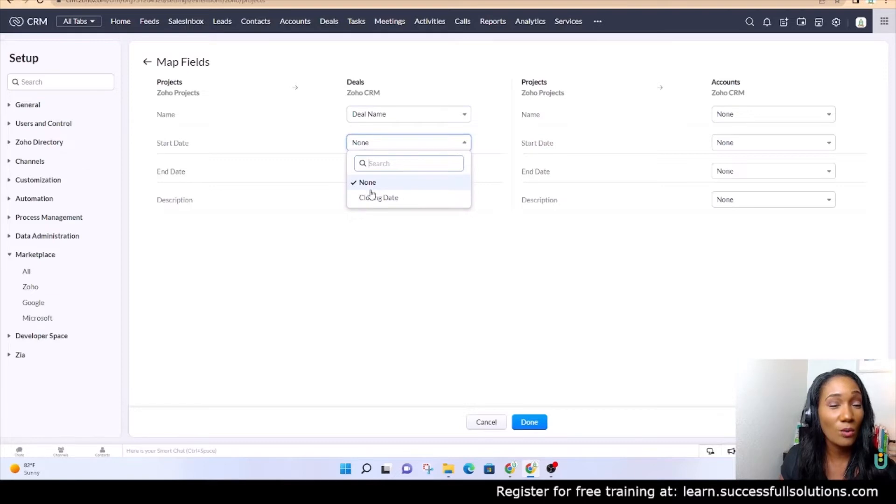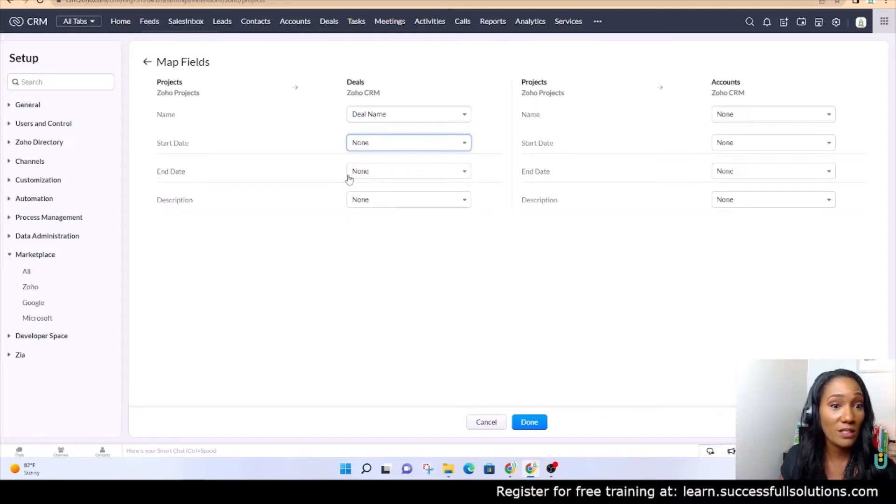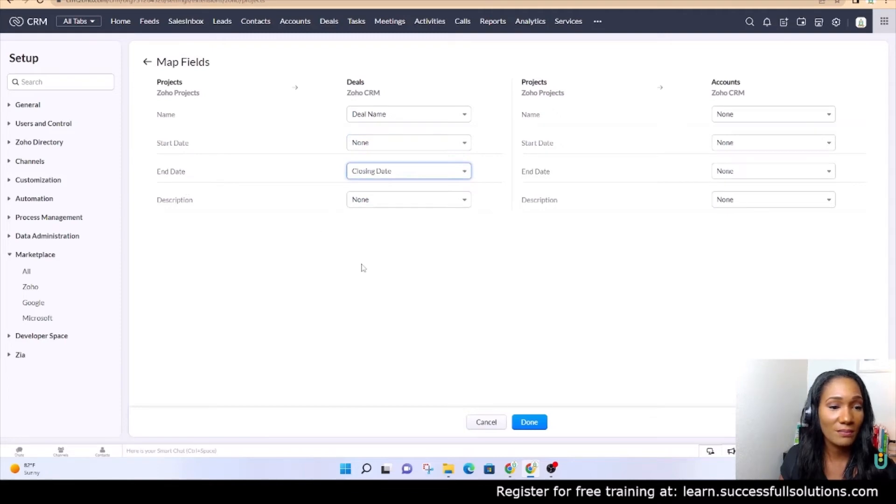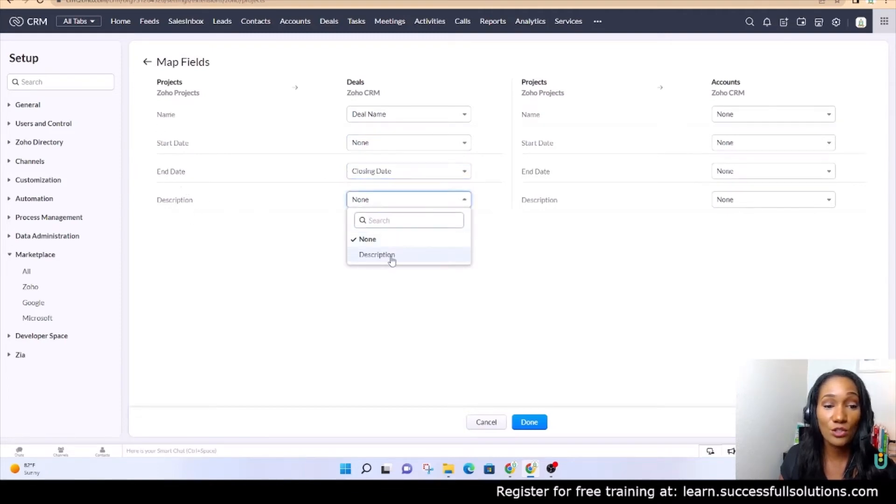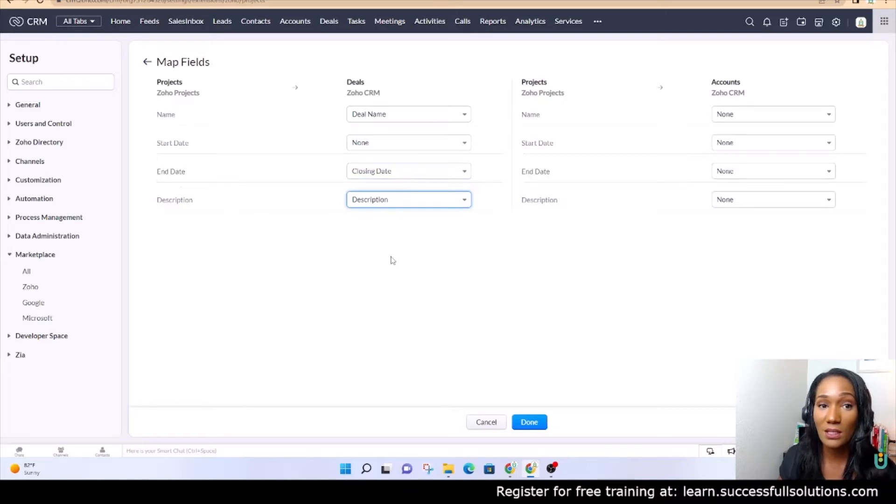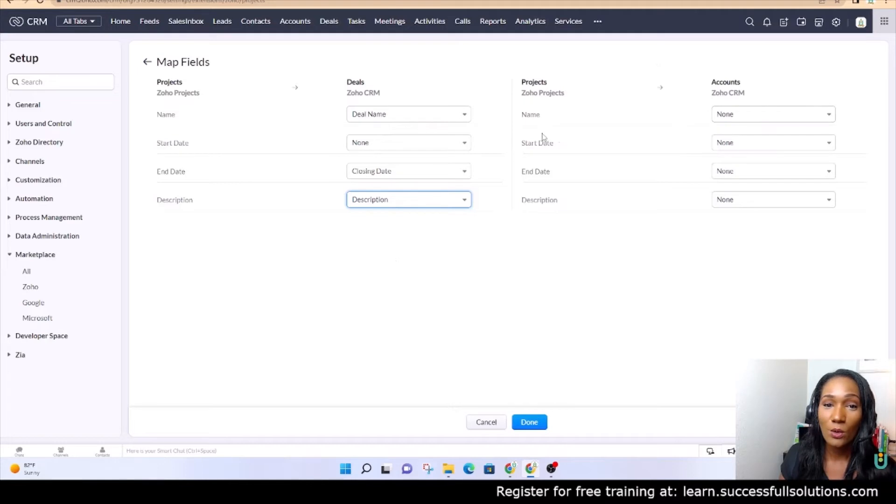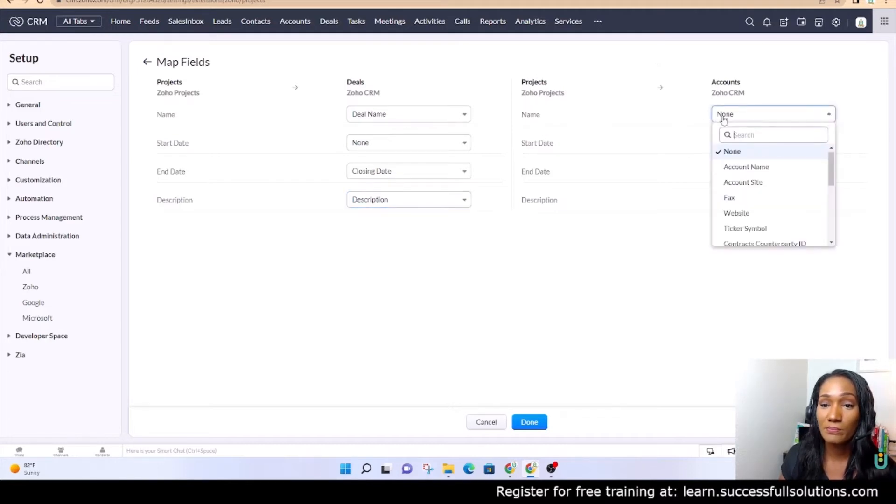The end date will be the closing date, and then the description in Zoho Projects will match the description in CRM for the deals module. Now for the accounts module, we don't want the name of the project to match the account name because the account name is the company. In this instance, if you are servicing customers, it may be the household or the address or the person's name, but that's not what we want here. So the only thing we're going to do is set this up for the deals.